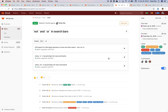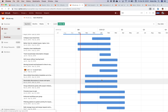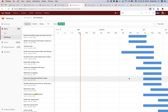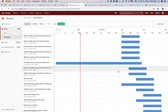The idea is that if these issues didn't exist yet and I said I wanted to accomplish this feature within Q1 2019, I would set those dates and view the forward-looking plan here. You can see my particular roadmap of epics — I've planned many things far into the future with fixed start and end dates. There's also another type of start and end date which is dynamic, which I'll get to later.